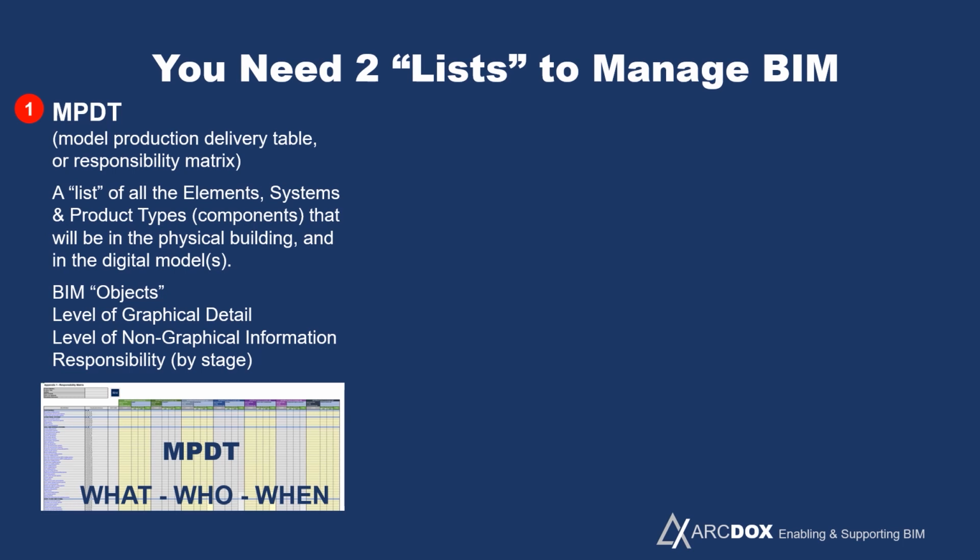So it's a long list of things, and for each object type we've got to define how much graphical detail we want in the three-dimensional object, how much non-graphical information we need at each stage of the project, and who's responsible for that thing at the different stages.